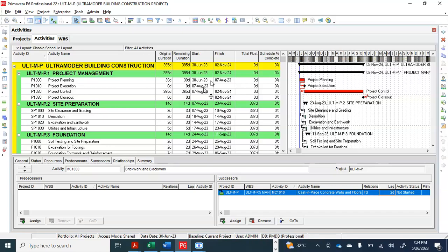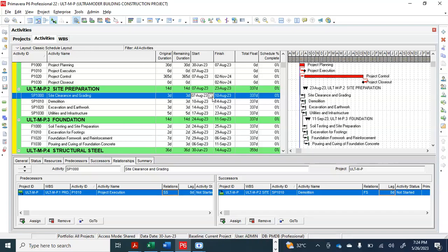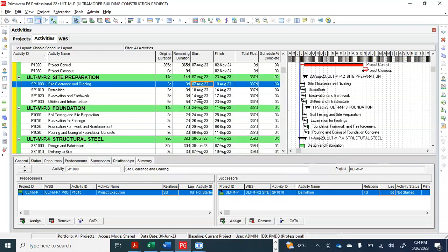If you want to adjust those years, what you need to do is to level your duration or this date. You start drawing the dates back, right? But I wouldn't have that time to do, because it's a lot, just the way we set up all these things. It will take a lot of time. But let's just assume that 2 months is a contingency. We keep 2 months as a contingency plan, should in case we didn't finish in 1 year, because the client gave us 1 year. But let's just say 2 months to cover up every other thing, which is realistic.